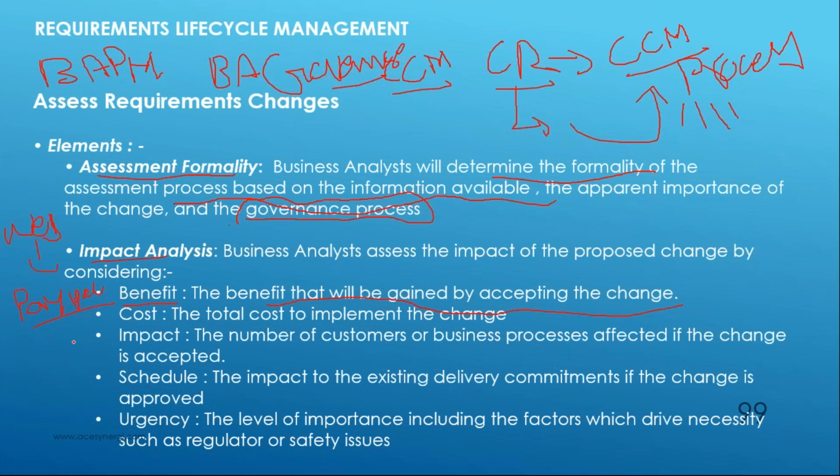But you also have to realize the impact analysis. What will be the impact? And here, the impact is that the regulatory requirements have to be considered in detail. When you talk about the regulatory, every country will have regulations in terms of when they deal with foreign exchange or non-country transactions in the form of different currencies. So those have to be considered. Without that, you just don't go and implement PayPal. So you do the impact analysis, and then you possibly take a decision. I just gave you an example of impact analysis in one aspect.